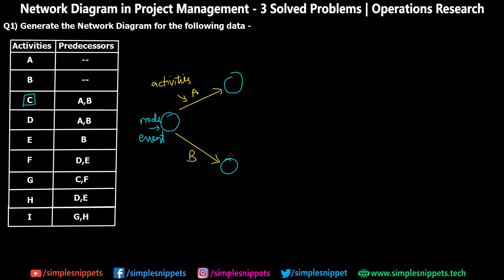We create a dummy activity from B, denoted by dotted lines — I'm drawing dotted orange lines. This dummy activity does not consume any resources or time. It just shows that A and B meet at a single event, because to start C you must complete both A and B. Right now A results in one event and B in another, and they cannot come to one single point since they start from the same node — that's not allowed. So we need a dummy activity here compulsorily. In general, avoid using dummy activities and only use them when there is no other option.